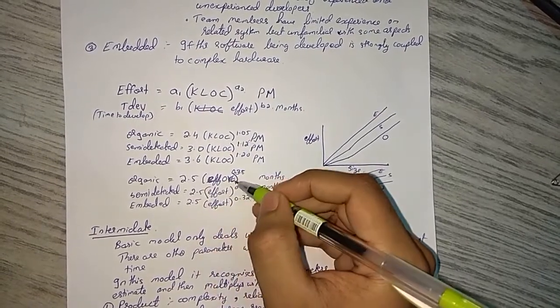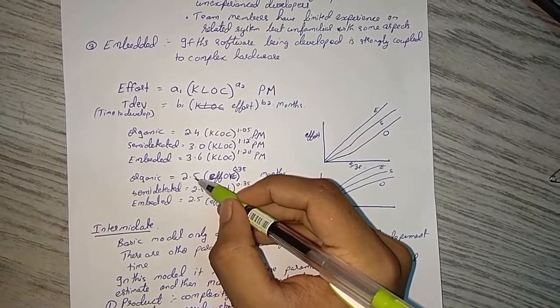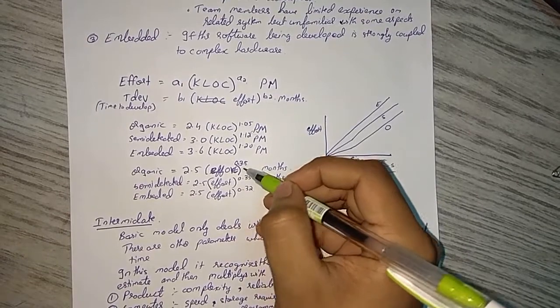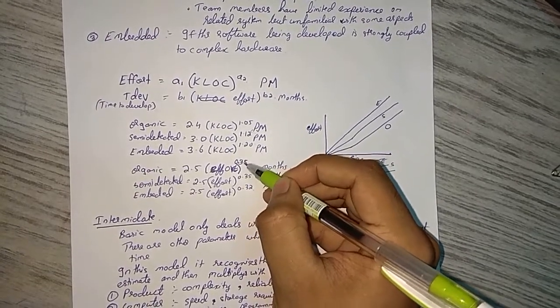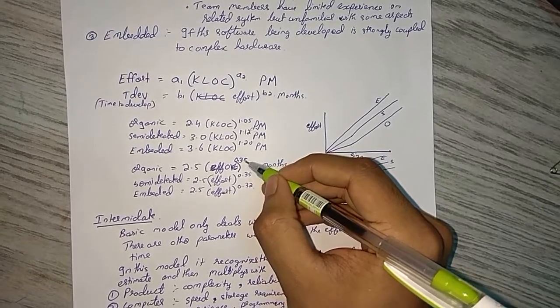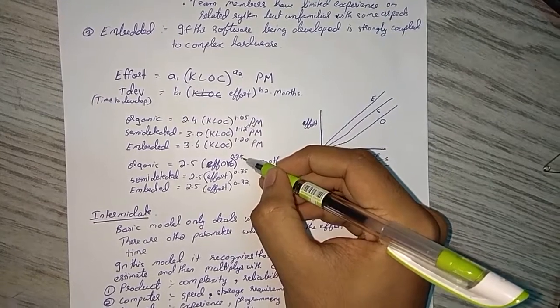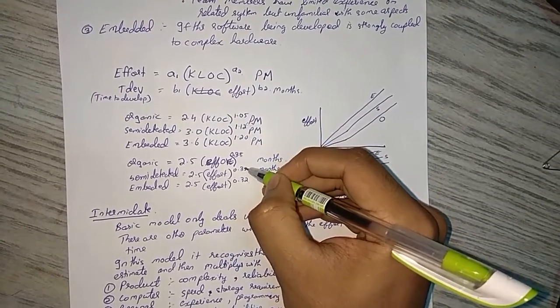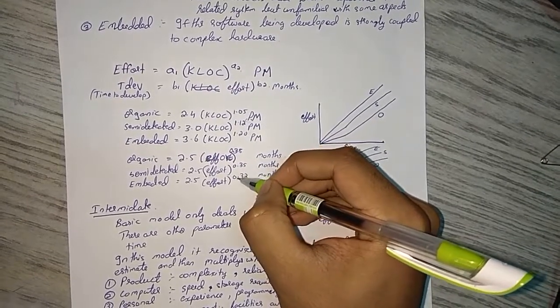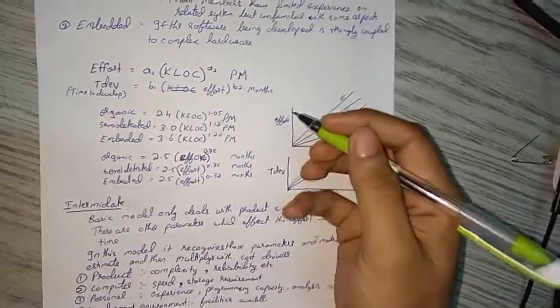Next, organic. In organic we have time for development. For organic is 2.5, here b1 is always 2.5 that you have to note it, times effort raised to 0.38. 0.38 means if it is the value of b2, then next time it will be minus 0.03, that means 0.35, then minus 0.03, that will be 0.32. That will be calculated in months.